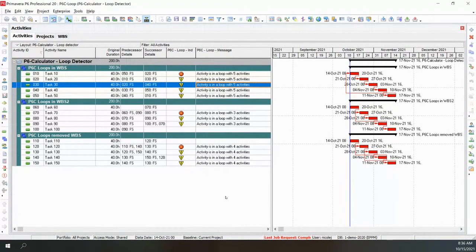Okay, so when you're doing portfolio reporting on many capital projects or many outages as well, you want to make sure that that reporting method is consistent so that your data date is moved consistently. So what we found was when there's loops, which you don't always know because you might do a bunch of logic changes and you didn't have a chance to reschedule, you may not know that you made a loop by mistake. Okay, so we created this loop detector, and it works really, really well.